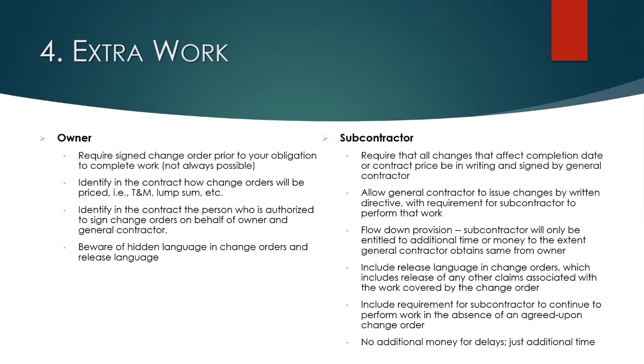Follow up, do the best you can, even if it's just an email where the parties say, here's our change order, are we good to go? The other side says yes, that's better than not having a signed change order at all. So think about those things. If things are moving too fast to get what you need right then and there, at least get an email out and get confirmation from the other side that we're all on the same page with the change order.